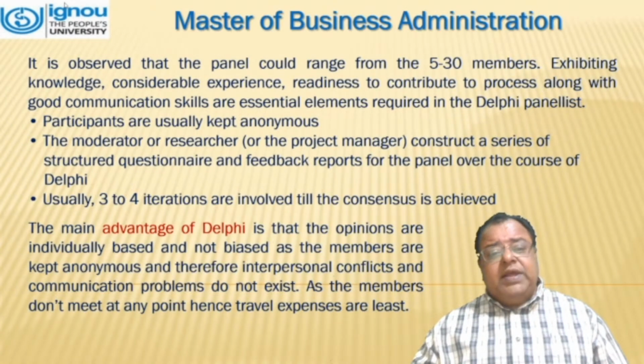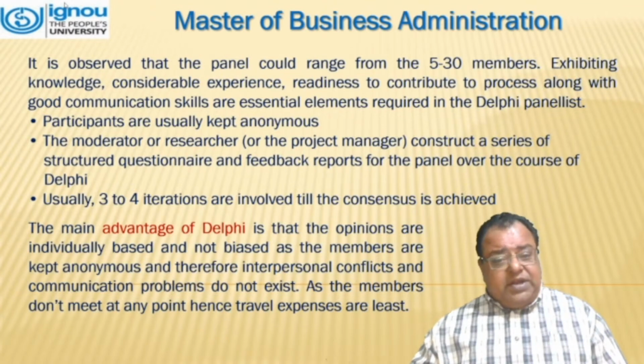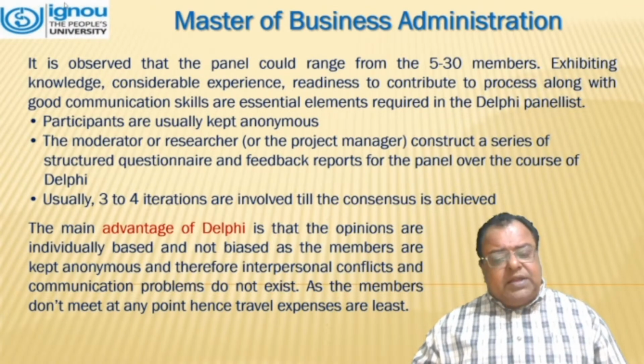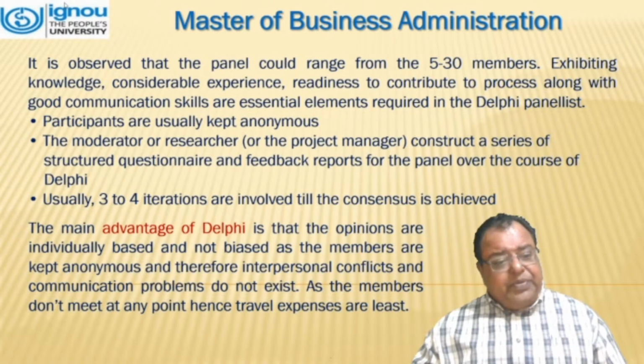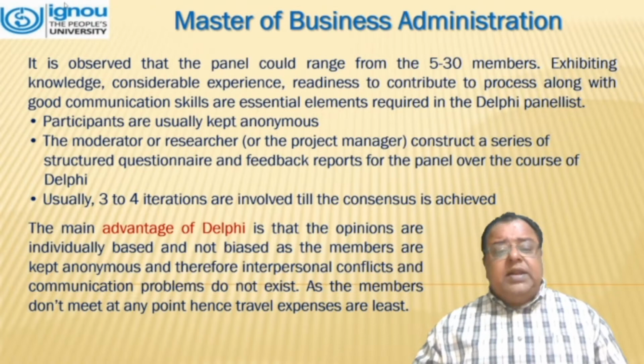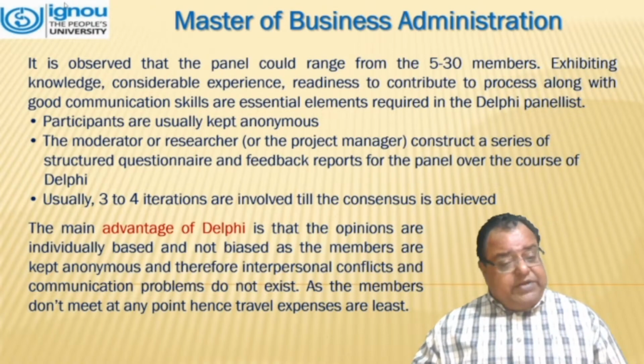Participants are usually kept anonymous. The moderator, researcher, or the project manager constructs a series of structured questionnaires and feedback reports for the panel over the course of the Delphi. Usually, 3 to 4 iterations are involved till the consensus is achieved.